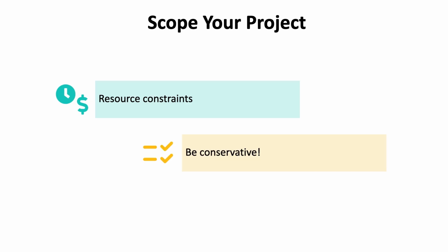The single biggest and most common mistake by far made by student and professional researchers is being overly ambitious. Do not expect or even hope that your first published scientific research will lead to a Nobel Prize. Choose a project that appears it could be done in much less than half of the available project time. It is always better to have extra time available to polish your project than to be scrambling at the last minute to meet a deadline. The worst thing you can do is be gathering data or doing analysis to the very end and not have time for making refinements to your write-up, taking enough time for thorough external reviews, etc.